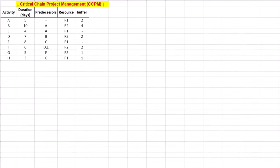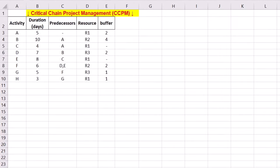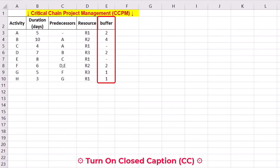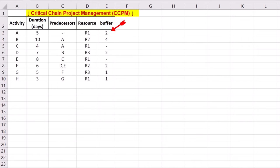Step 1 is replacing scheduled padding with a single project buffer. Our case study focuses on a project with duration estimates for its eight activities. Due to existing uncertainty, a safety margin or extra time is considered for critical activities. For example, activity A's duration has been padded with a buffer of two days.